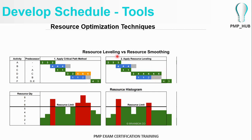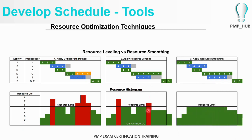Once resource leveling is done, we can perform resource smoothing. The second constraint is the project cannot have more than five resources at any given time. After resource leveling, at certain points we are using seven and six resources. Using the available float, these can be smoothed out so that we stay within the resource limit — pushing man-months to other periods. Hope you got this example.